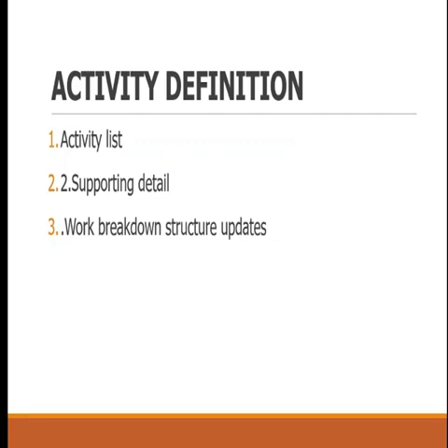So if you have your list, the next thing to do, you will update your WBS. Look at number 3 here. Update what? WBS. You know why? As you are breaking down the WBS, because of progressive elaboration, remember in the first module, there are certain things you will see going further in your job that you never saw at the beginning. So once you keep seeing new elements popping out of the work you are doing, you need to go back to your WBS and update it.